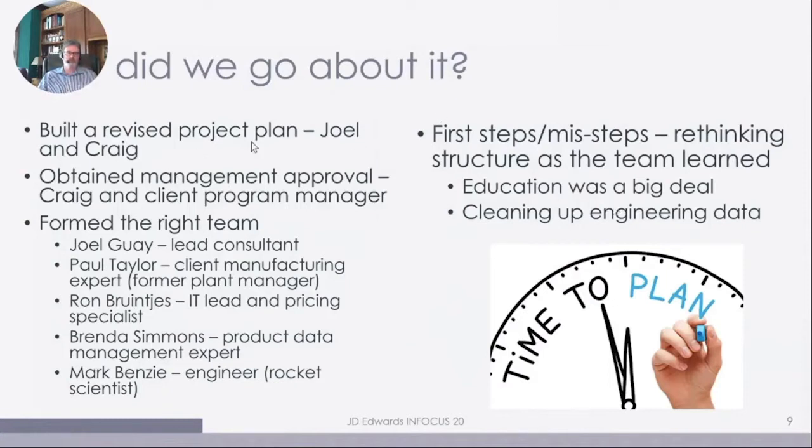I worked with Joel to re-estimate the project. We had conversations like we just had. I said, Joel, how many configurations do you think you've got to make? And he worked with the business and looked through the catalog and talked to engineering and customer service and manufacturing. And he said, Craig, I think we've got to create this many configurations to begin with, based on what we know right now and how we think we're going to use the configurator. But we haven't rolled our sleeves up yet and really dug into it.